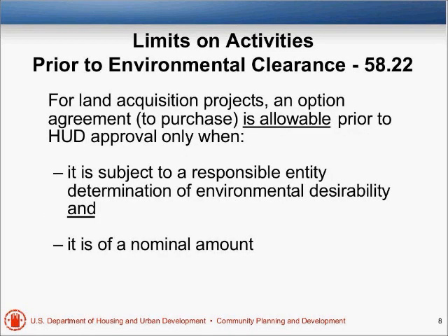So don't do that. Let me underscore that, this is Charlie Bean at HUD. I just want to underscore what Eugene's just said, that this is a point that everybody has to put down in big bold letters. Neither the recipient of the funds nor anybody involved in the development process can commit or expend HUD or non-HUD funds to the project until the whole environmental review process is completed. Very, very important. It can kill your project very clearly if you do that. Go ahead, Eugene. Underscore that. And we don't want people crying about it, so don't do that.